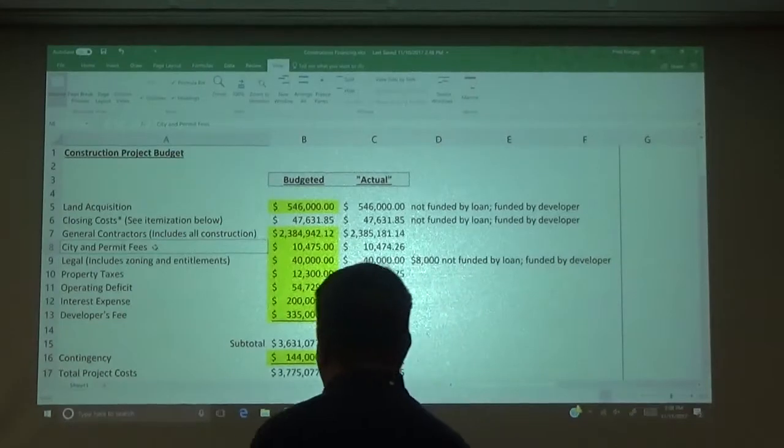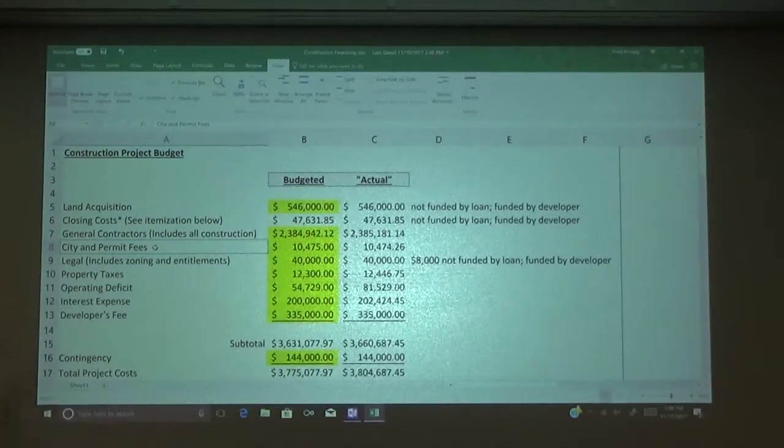Okay. Now the others of these, we're going through this, obviously permitting fees with the local government. Even though the property may be zoned the way that you need it zoned, there still are probably going to be fees and charges, permitting fees that you're going to have to pay to the local government. Usually those fees are supposed to go toward having their inspection teams go out, physically take a look at the property, ensuring that you're doing what you say you're going to be doing, that everything is up to code and so forth.